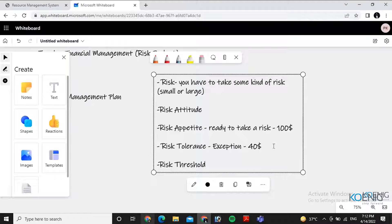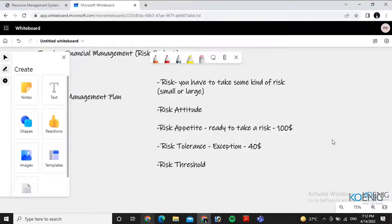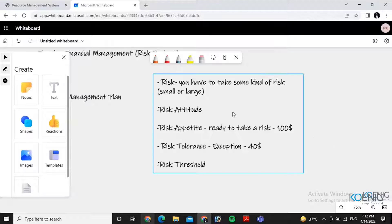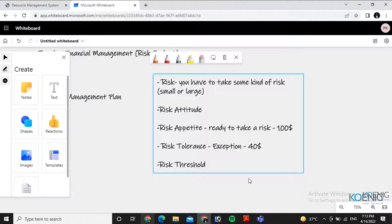Risk threshold means total risk capacity: $100 plus $40 equals $140. First you will try to use only your risk appetite. If you cannot handle the risk with that amount, you approach the tolerance amount. If risk goes beyond the total threshold of $140, either you do some modifications, make changes, or you stop the project.